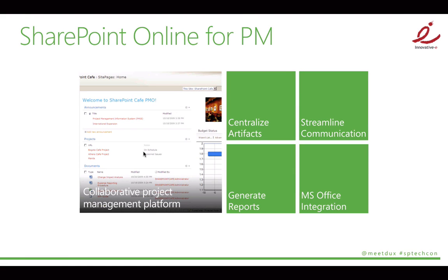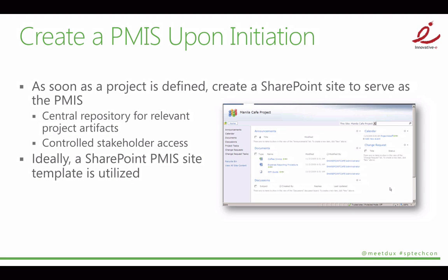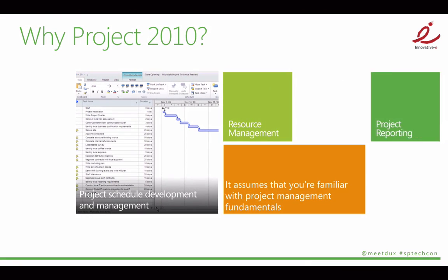So again, when you get started, take advantage of SharePoint, create a PMIS, create a centralized repository instead of relying on email. So as soon as the project is defined, create a SharePoint site to serve as your PMIS. This will be a centralized repository, and ideally, it should use a site template.